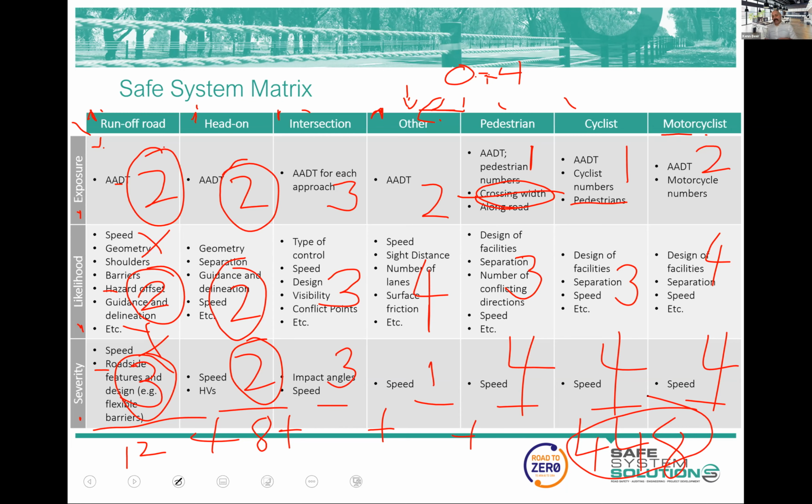Now there's something interesting. Why did they put numbers to this rather than the way we'd usually do a risk matrix and put highs and mediums, lows, or likelihood, likely, probable, the like, and they went with numbers. And there's some beauty to the utilization of numbers. Because if you put a 0 in any cell, what's anything multiplied by 0? It's 0.